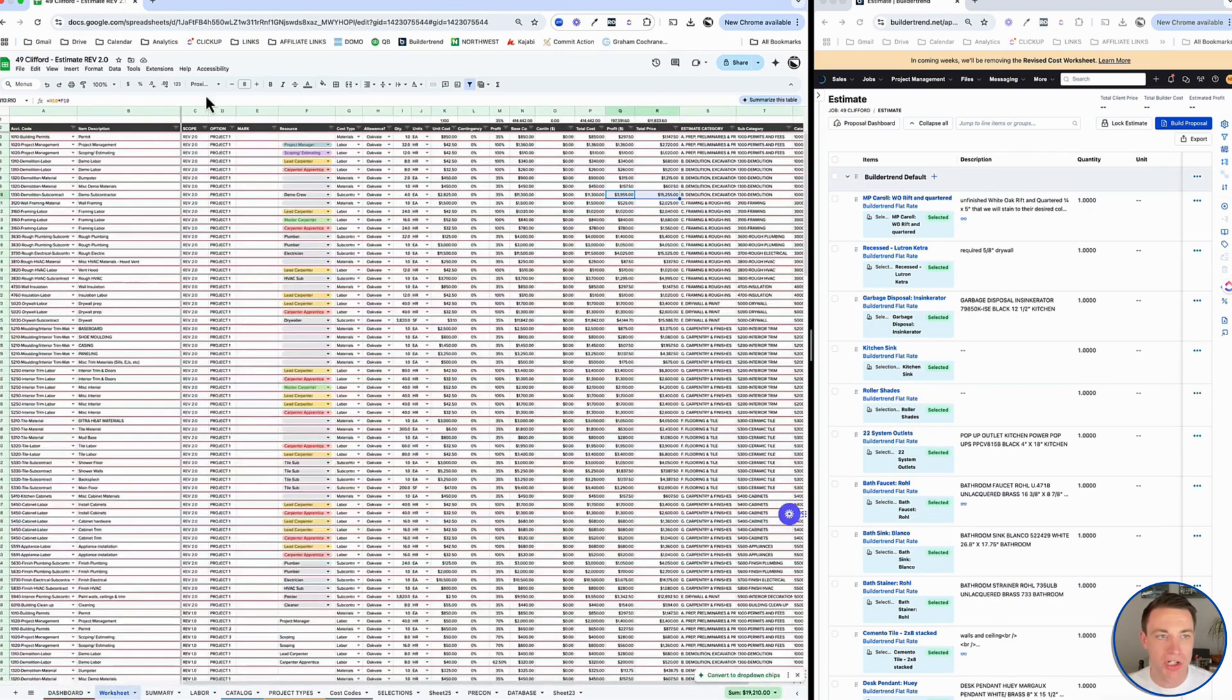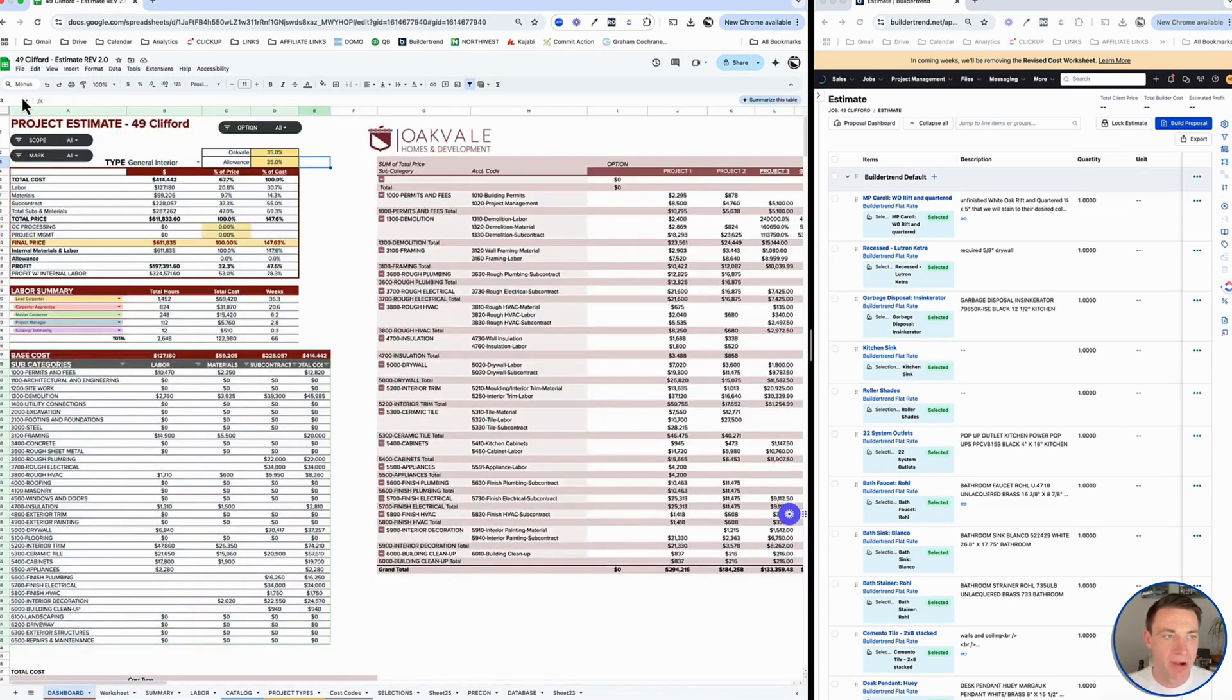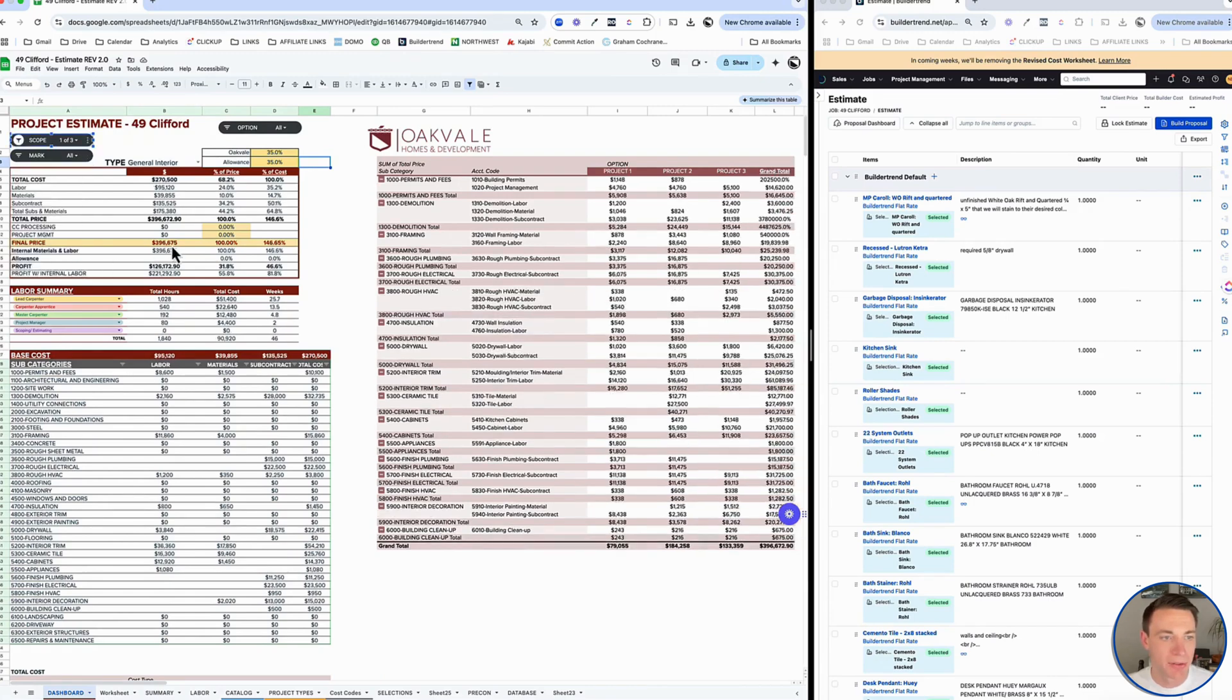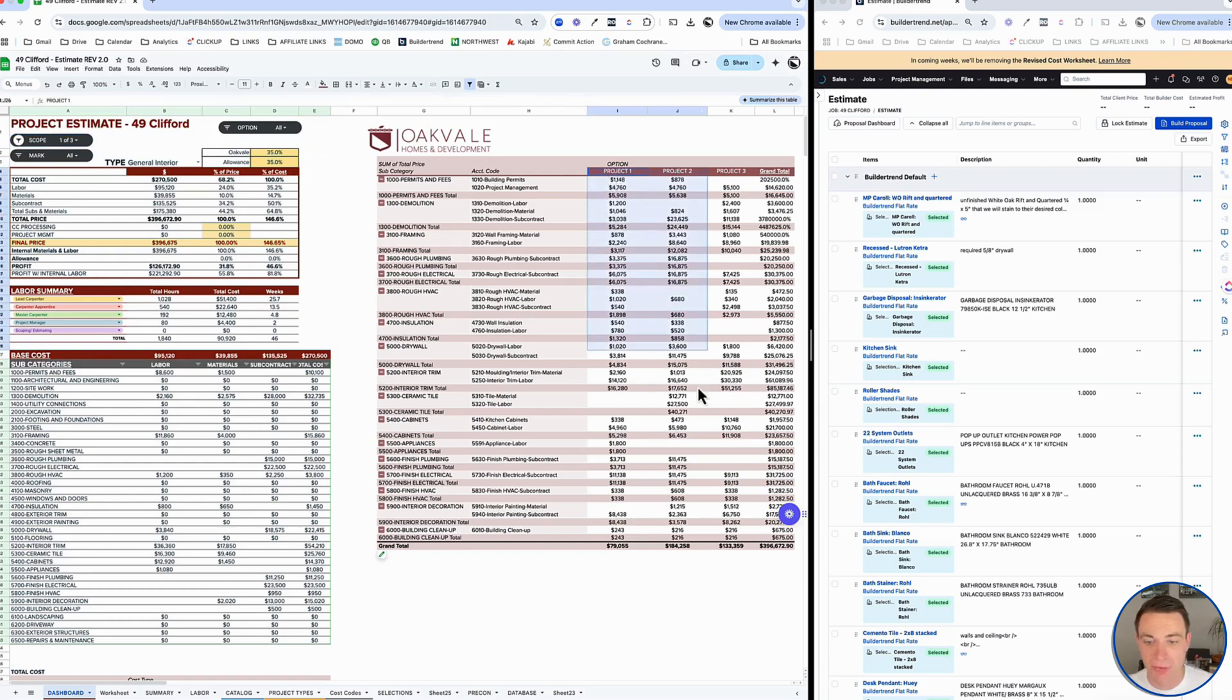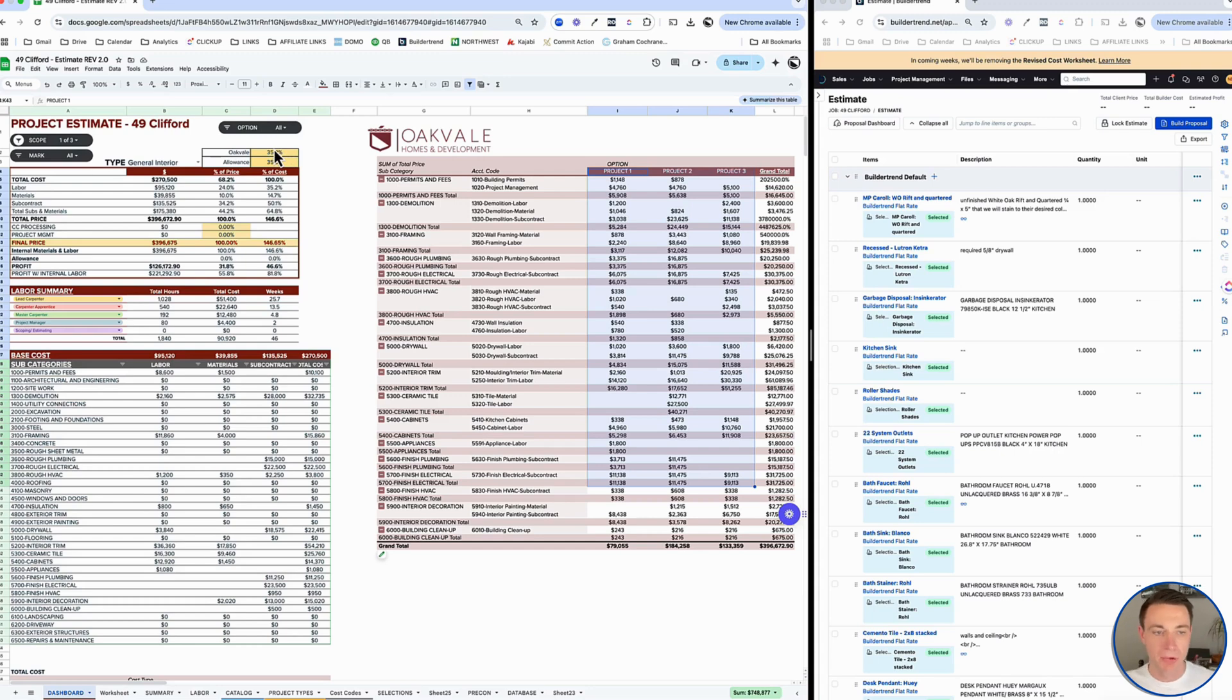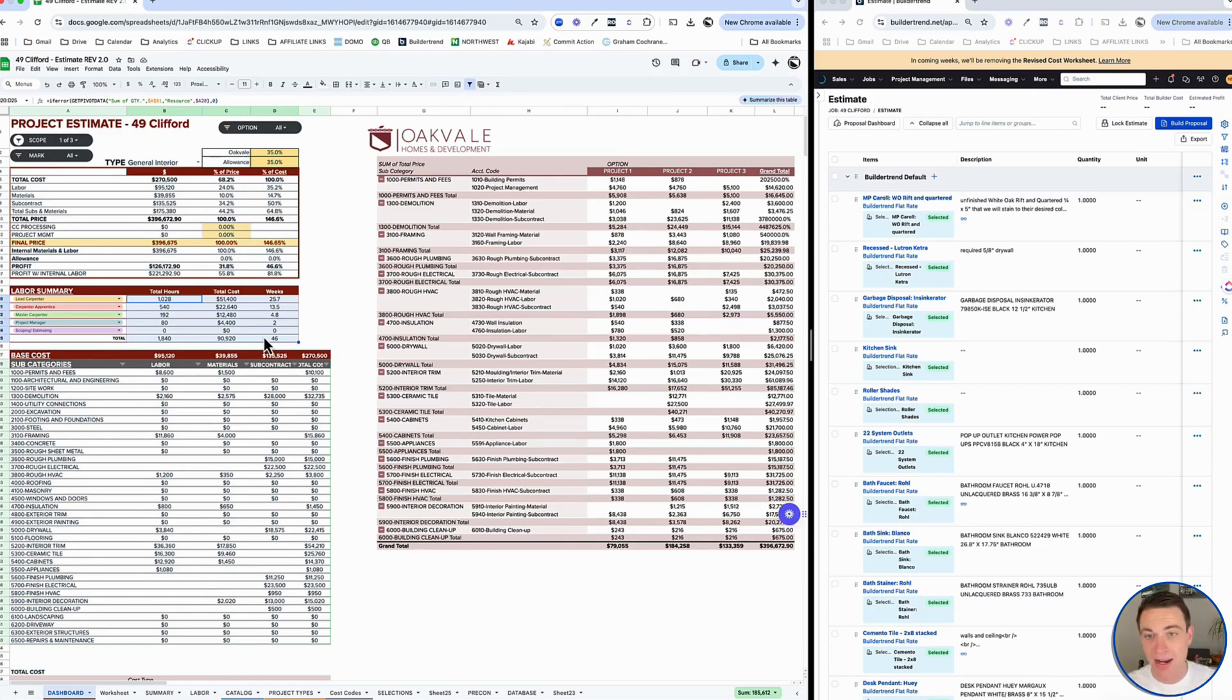In the worksheet, I've got scope and I've got option. I can play around and say our initial scope of work was revised one at $396,000. Within that, I've had different options or different projects, and we can decide if we want option one or project one, two, or three in or out. We can play with that and do value engineering. I could also adjust my markup more specifically. I can see my labor coming in. I can do some sanity checking against past projects. That's why I like to use it.